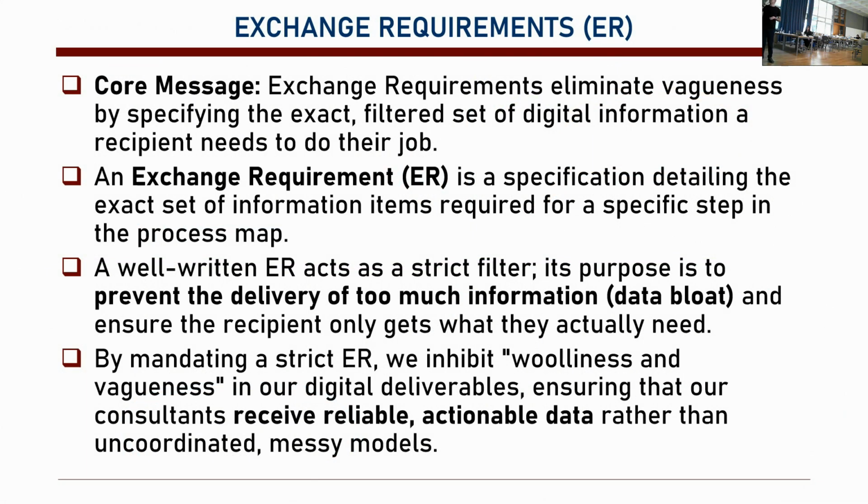And the exchange requirements, ER, basically we define what is required for the data in that exchange, okay? Because we don't want to deliver too much information. That's data bloating. Bloated data makes things difficult, okay? So we want to receive reliable, actionable data. We don't want an uncoordinated, messy model, okay? So we are trying to inhibit bloat and weightiness of data. So we don't want all these chairs, tables, beautiful Porsche cars, etc. in our models. We want very simple models.